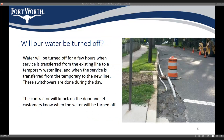During the construction of a new water line, there will be times when your water service will be interrupted. It'll be turned off for approximately a few hours as service is transferred from the existing water line to a temporary water line, and again when service is transferred from the temporary line to the new water pipe that's been installed. You'll be notified when this service interruption is about to happen.